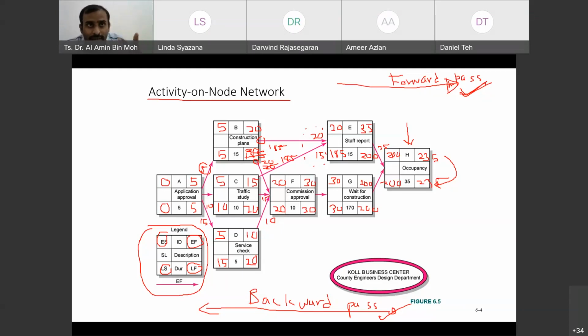So it's like you have some time to plan if anything goes wrong. You know, it means that the activity can be delayed up to that slack time without what? Without delaying the completion of total time. Okay, let's finish it first. So what should we do?